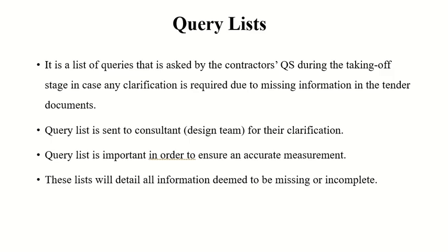Doctor, what's the definition of query? I don't get it. Query means a question. You're looking at the drawings and you found that something is missing or has a problem, so then you do the query. During the taking off process, if you need any clarification or any item is missing, you will do a query list, and it is sent to the consultant normally, because he is the one who is designing it.